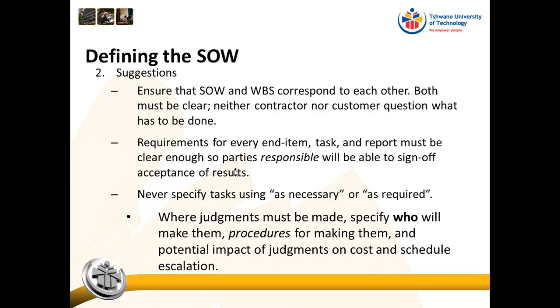as specified, we might need to add more lampposts, but that will mean that there will be a cost and schedule escalation, which will be for the cost of the client. So do you see that then we will have to have a CVO, and the client will then have to pay for those extra lampposts.